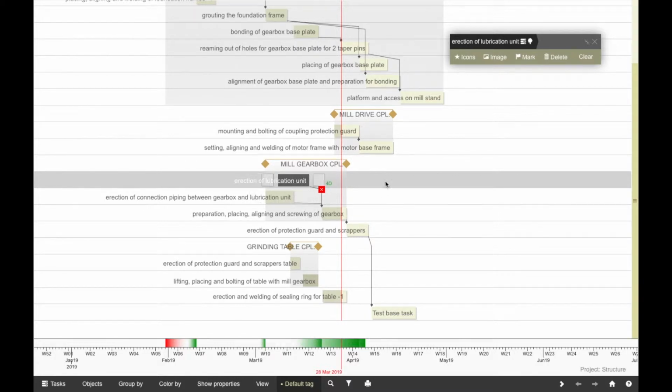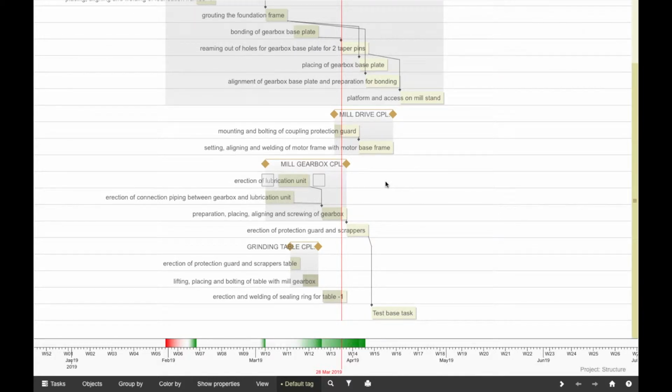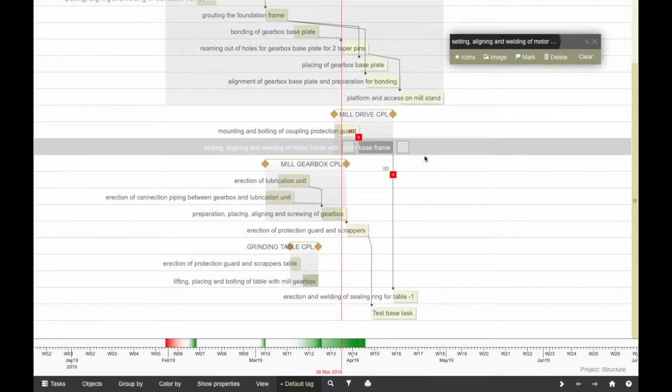The tasks, when they are in the states test or plan, can be connected by links. The linking is carried out through dragging the links from the square icon of one task to another. Through linking, only segments of a task are taken into account when they're in the test or the plan state. To delete a link, it is necessary to highlight an object and to press the cross on a link.